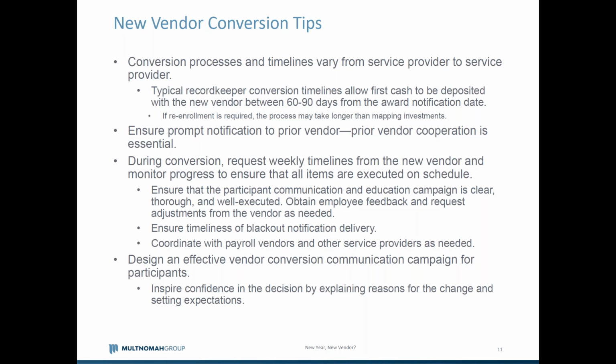During the conversion process, I think I mentioned, we think a best practice is weekly calls with the conversion team, the staff at your organization, and the consultant potentially if you're working with one, just to make sure that you're on track, that you understand what's expected of you, and that the vendor can make sure they're delivering on what's expected of them. Those calls frequently can be used to troubleshoot the little issues that pop up in every conversion. There tend to be hundreds of small decisions that need to be made during the process that you want to make. You don't want to have the vendor assume they are being made, but those calls keep you on track and allow you to coordinate and interact with them and make sure that you're making those decisions and understand the consequences and ramifications of that.